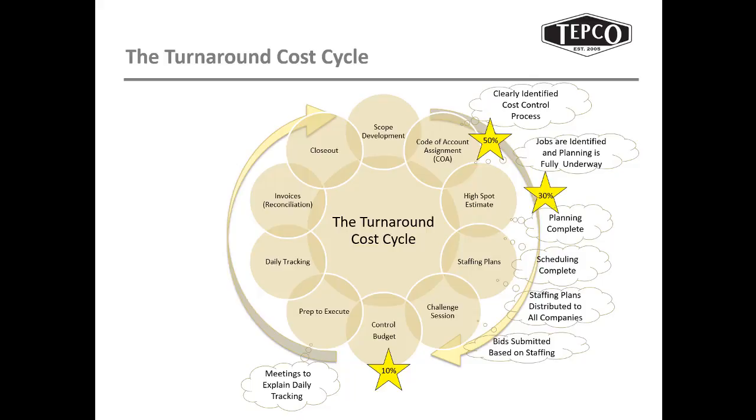So we prepare people for what they're going to be doing on a daily or a shiftly basis. Once the turnaround starts, there should be no changes. I mean, there's going to be changes to the work that's being performed, but from a reporting, a cost control perspective, and a scheduling perspective, it's locked, and it's been locked during the last part of this whole cycle, saying thou shalt do it this way.